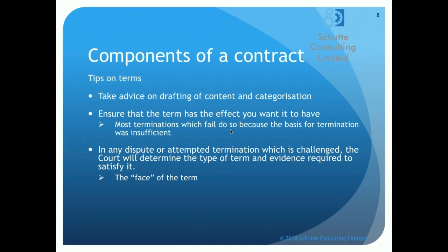So the court will look at the face of the term. In other words, what does it say in the words? Does it say one party undertakes to do something? Aha, it's an undertaking. So you look at the face of the term. What does it say on its face? More importantly, you look at its intended purpose. Is it a term which goes to the heart of the contract?